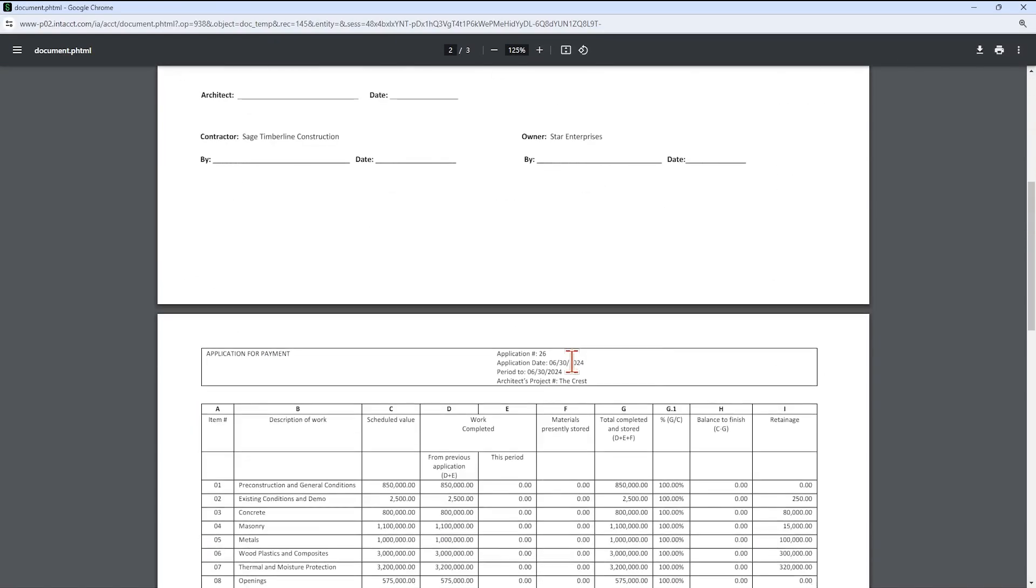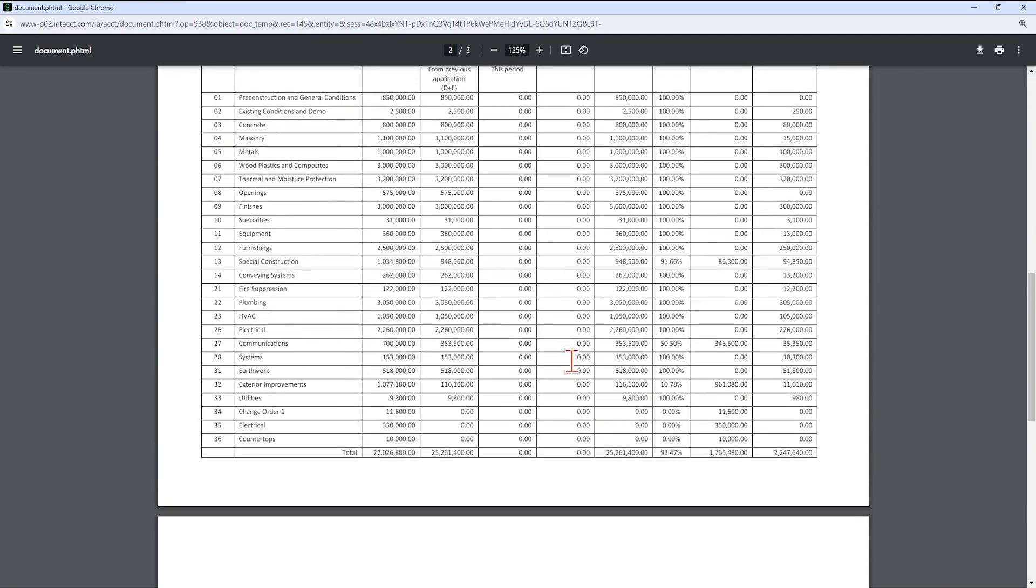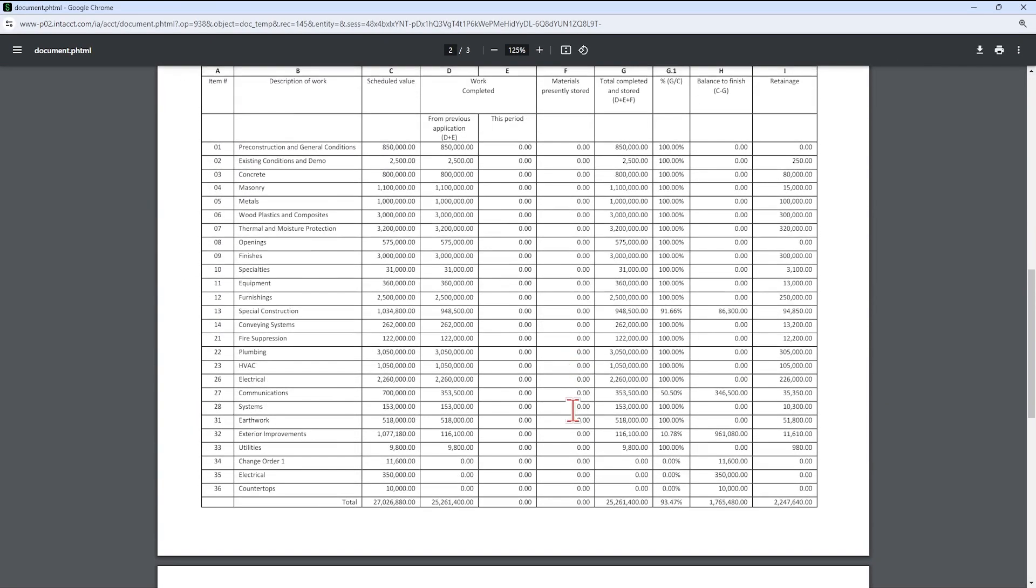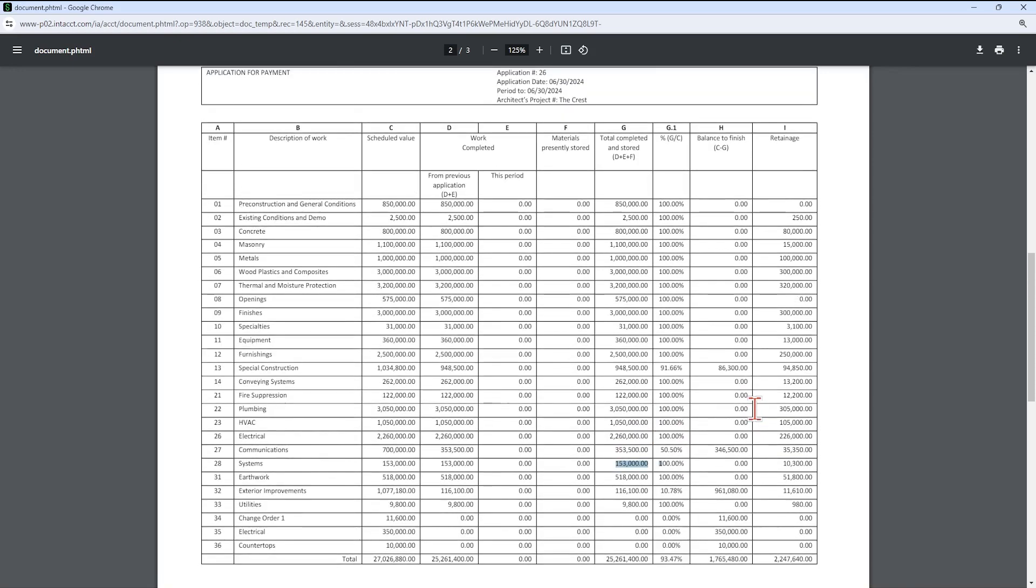Okay, so I'm going to first go to page two. And we're looking at this 28 systems line. So we're going to compare this to the input screen here in a minute. But notice that has $10,300. So I have $153,000 totally completed and stored to date. I've billed 100%. My retainage was 10%. So I held up $15,300 and I billed $5,000 on my generate invoice screen. So my $10,300 is what's remaining for retainage.